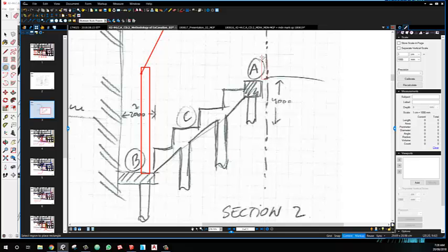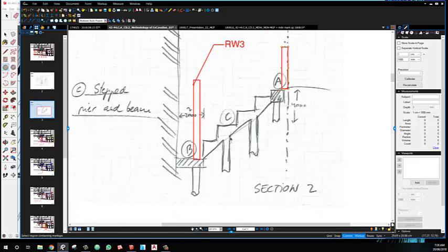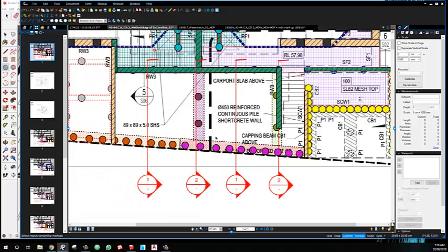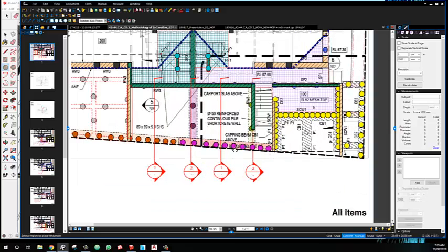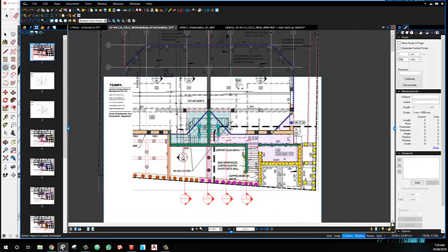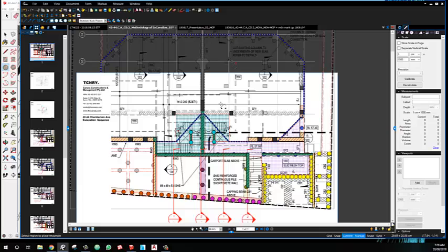Now, finally, have in mind that this is the fence on the top, and this type of thing happens in here, and in here probably. So please send comments. In the first few days, the guys on site are going to work on this piling, but soon they will reach this point, and then we need some more details. We need all this finalized by Thursday, so we can order all the steel that is now on our critical path. Ideally, we can finish this today, and that'll be even better.